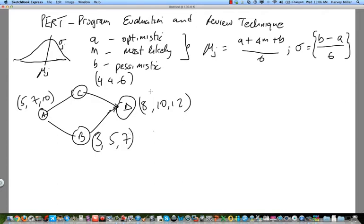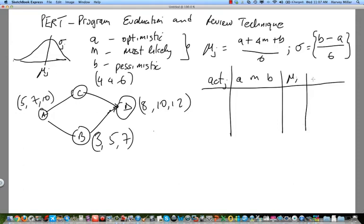So given this data, what we would do is create a table where we would say, okay, give me the activity, activity J. Give me your A, your M, your B. And then we would estimate our mu, estimate our variance. And so for example, A, we would say is five, seven, ten. But to estimate A, the mean of A, we would have to say five plus four times seven plus ten.